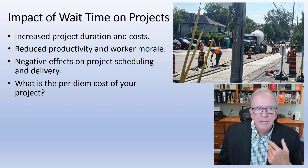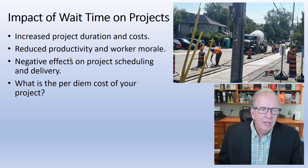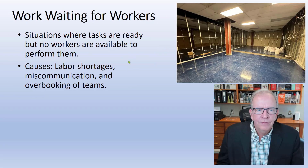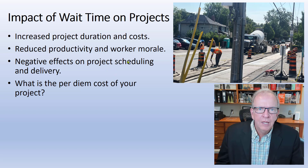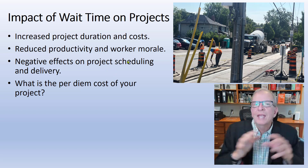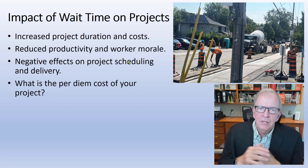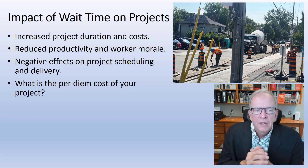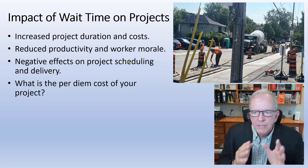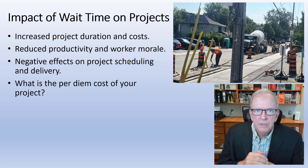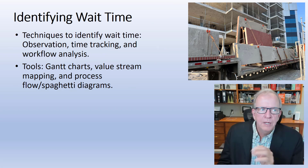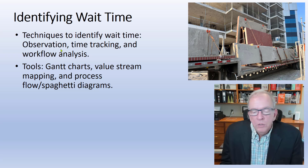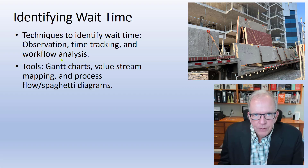The impact of wait time includes increased project duration and cost — nobody likes waiting. There is a per diem cost every day you're on the project, and even when nothing is happening, costs are still being incurred. To streamline the process you need to identify wait time through observation, time tracking, and workflow analysis. You have to be watching, looking for these things, thinking about them, and then acting on them.